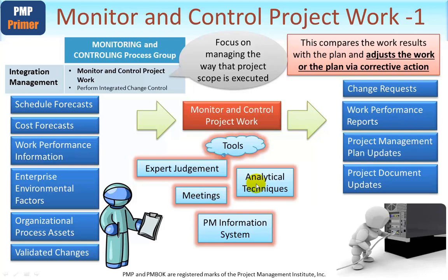And talking of root causes, analytical techniques. These types of techniques, which we'll look at quite a few by the way when we get into quality, look at the raw data and amongst other things look for root causes and to spot trends. Also of course to make sure that the project is operating within tolerances in terms of risk and in terms of schedule and time, for example. If you've got a project planning tool, you may well be looking at data from that and doing what-if scenarios to see if forecasts can be modified and what type of actions are needed.